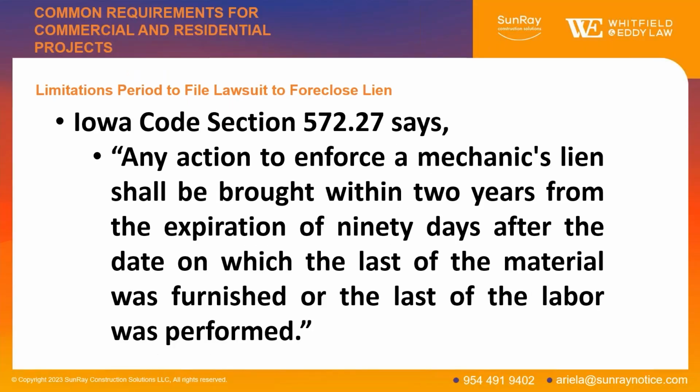Okay, so if you filed a lien, what's the deadline to file a lawsuit to foreclose it? The answer is 2 years and 90 days from the last day of work. So the deadline to file a lien and the deadline to file a lawsuit to foreclose the lien are the same, 2 years and 90 days. So 1 day before this deadline, you could technically file your lien, serve it on the owner, and file a lawsuit to foreclose. And you would be within technically the deadlines of all of